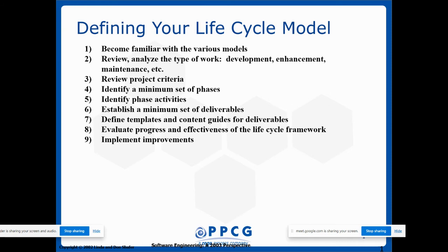a vital role. So I have to come across my project criteria, nothing but constraints. All the constraints are there. That should be reviewed, and I have to identify the phases of development, not only for development in SDLC, from analysis to requirements gathering to documentation to maintenance, that we have as phases. What are all the activities that I'm going to do in each individual phase? For every process, I must have an input, which could be a requirement, and an output, which would be a deliverable. So for each and every phase, you have to decide how many requirements you are going to keep and how many deliverables are going to come.